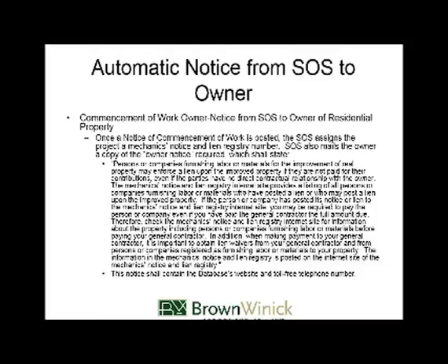So I know someone asked me a question the other day about where do you get your number? Well, it's automatically assigned by the Secretary of State's office when things are posted. So that's where the number comes from. And when that notice of commencement of work is posted, the Secretary of State notes that, puts that on their system, and sends another notice to the owner. Again, we're bending over backwards here for these unsophisticated owners to tell them what's going on with their property so that they can prepare themselves accordingly for potential liens.